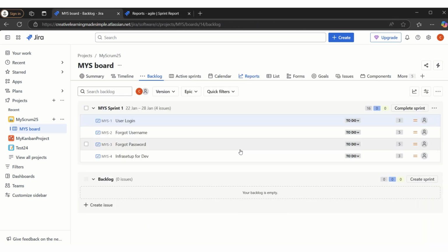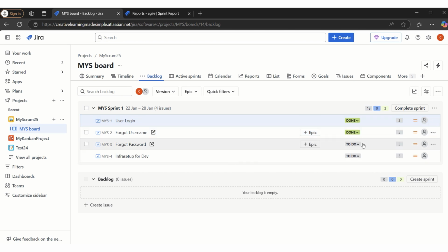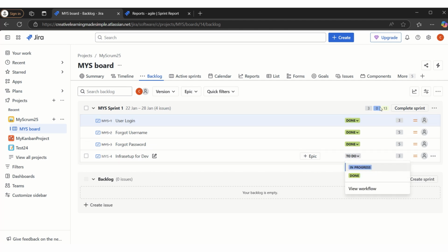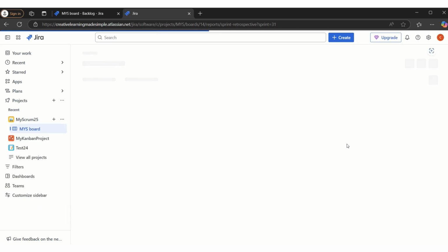Now, for our understanding, let's mark this one as done, and this one also as done, and this one also completed. So out of 4, we have completed 3 user stories. As we can see, 13 story points of work have been completed, because it's 3 plus 5 and 5, and 3 story points of work is still in to do. Maybe if I say in progress, it will come here. If I go back to the sprint report and refresh my screen, now we can see...